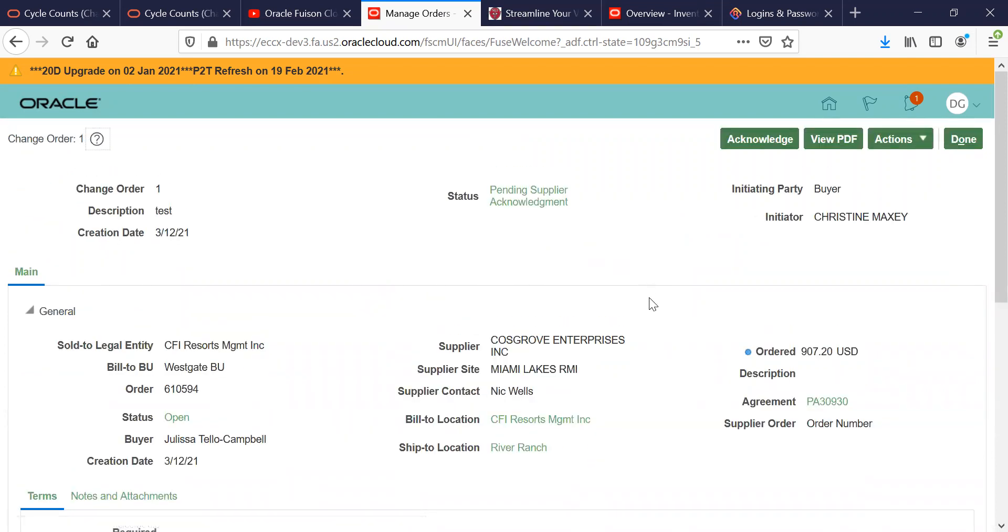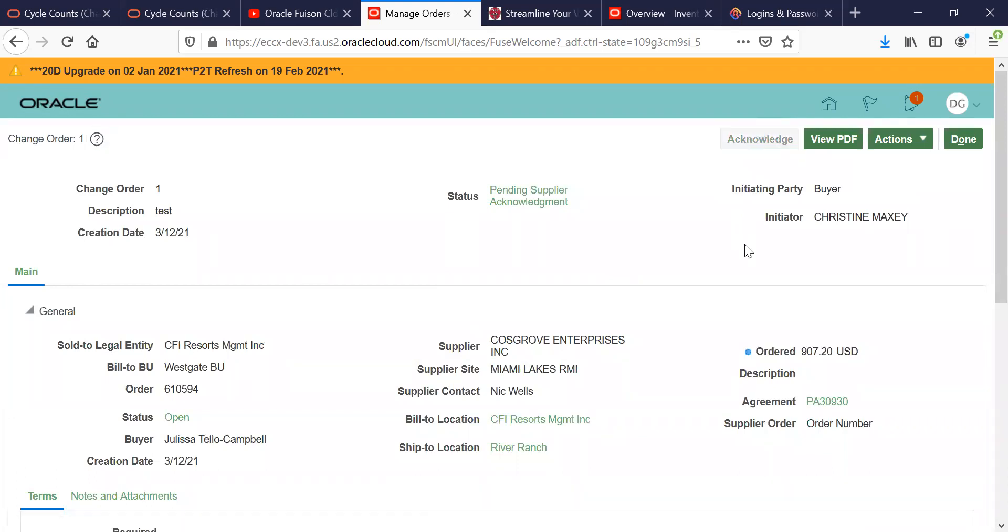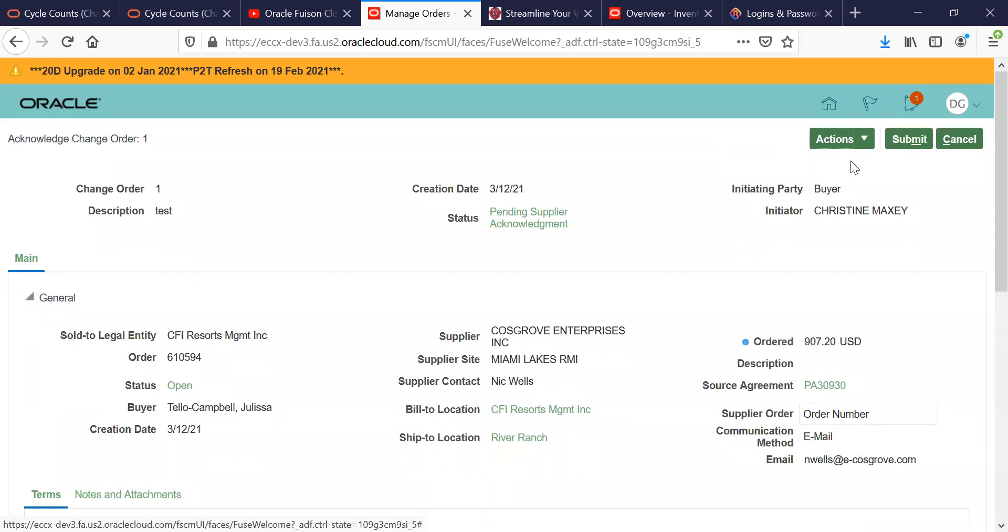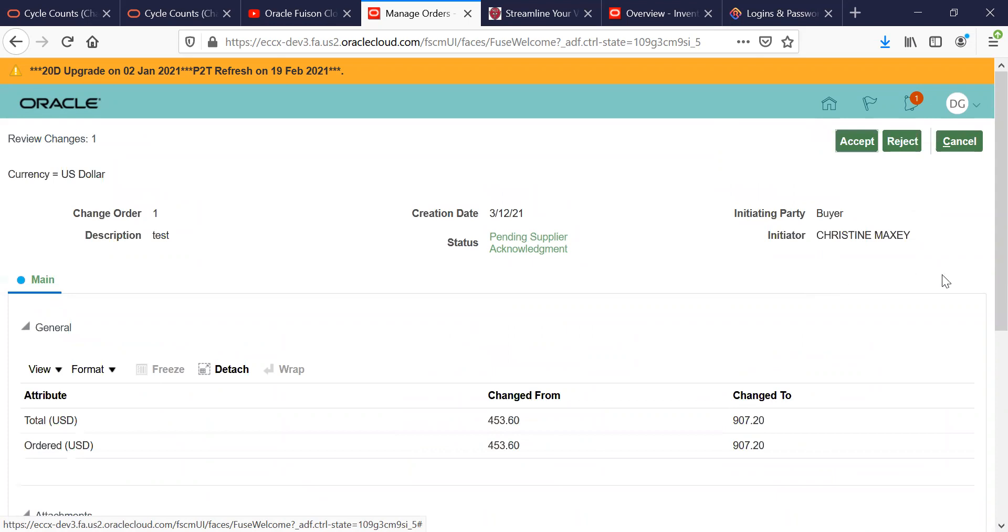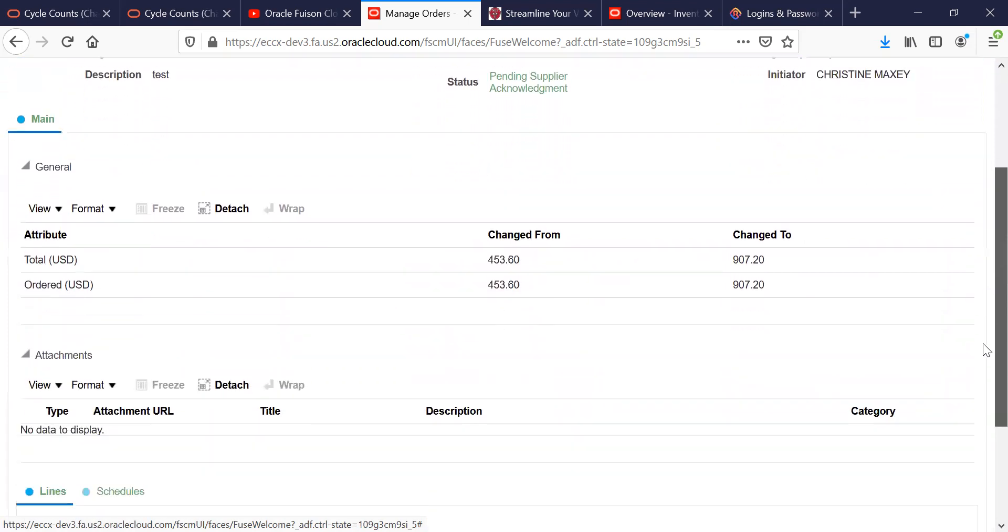When you're in your purchase order, the first thing you're going to do is hit the Acknowledge button. You're going to go to Actions and you're going to want to review the changes. When you review the changes, this is going to show you the changes that the buyer has made to your purchase order.